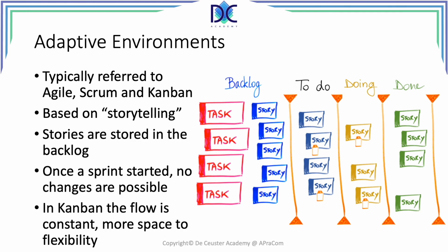Scrum does not have a detailed planning and changes can be done frequently without any impact on the project planning. Changes are easy to do and the project can be adjusted flexibly to new requirements and needs. A variant of Scrum is Kanban. In this system, we use a similar board, but we call it a Kanban board instead of a Scrum board. In Kanban, there are no sprints, and stories are added constantly to the project baseline on the priority set by the project team and the product owner. A Kanban project is using flow similar to lean operations and provides a very flexible way to manage projects.